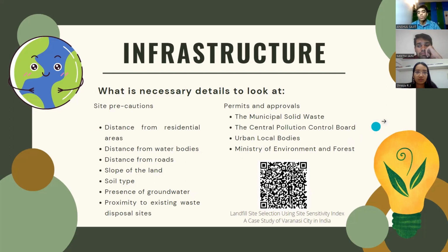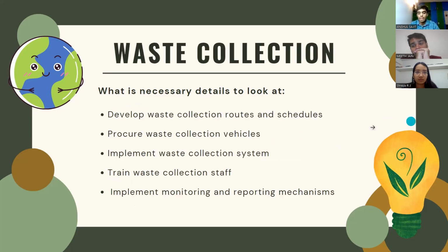Now, permits and approvals are required from the following bodies: the Municipal Solid Waste Management Board by the Government of India, the Central Pollution Control Board, the urban local bodies that every state and every city has, then the Ministry of Environment and Forests. Of course, we have to look into the forest also, which our waste disposal may affect. I have given an example: I've taken a research paper on landfill site selection using sensitivity index, a case of a city in India, Varanasi. Next slide, please.